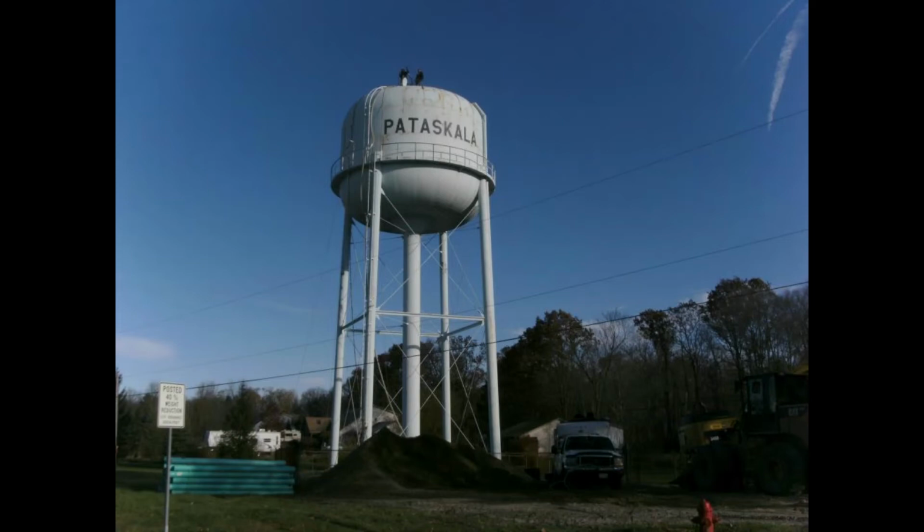Okay, do you want to go ahead to your 2-inch water line, your proposal that we have on the agenda for tonight? Yes, sir. This is a resolution on the consent agenda. This is for Verdantis to do the inspection of the next water line project that we have. They've given us an hourly not to exceed of $36,000. That is 10% of the construction, which is $360,000. It's a little bit higher than we usually shoot for.